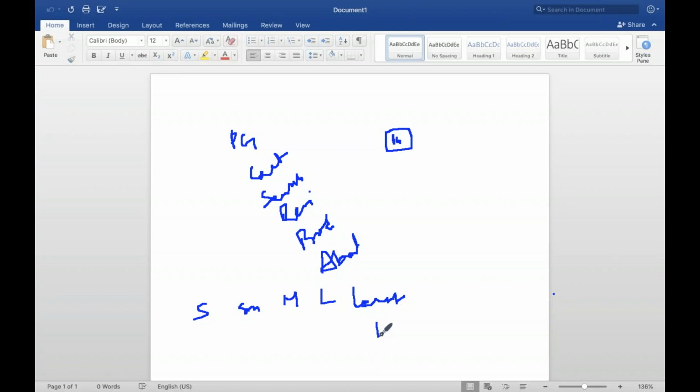The Largest. Okay. So I kept it as under largest. Then the discussion may happen. So Sadiq says it cannot be largest, right? Or Shivram says it can be large because of this reason. Technically, discussion may happen. Then Jyoti also may agree, and finally they will move it to large, right?